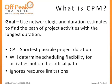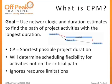The goal of Critical Path Method is to use the network logic determined during activity sequencing and the estimated activity durations to find the path of project activities with the longest duration. In the example pictured, the path of Task ABD is longer than Path ACD. Once the critical path has been determined, it helps the project team understand the shortest possible duration. Since activities ABD must be done in sequence, the project cannot be completed any faster than it will take to complete this path of work. So by finding the longest required path, we can find the shortest possible project duration.